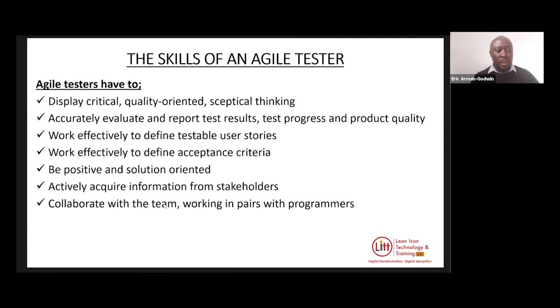And an Agile tester has to collaborate with the team, working in pairs with programmers. I think I've mentioned this a few times, that we have to work alongside developers. I've been in tasking meetings, when developers are breaking tasks, and sometimes I get involved in there as well, because you find that sometimes you can give them feedback, and then the test analysts can get a lot of information about how the developers are going to break the application down, the different small bits.